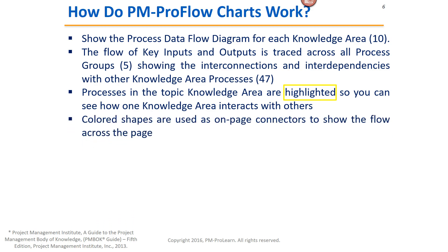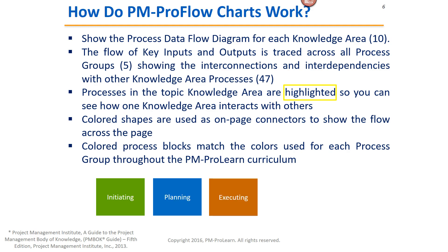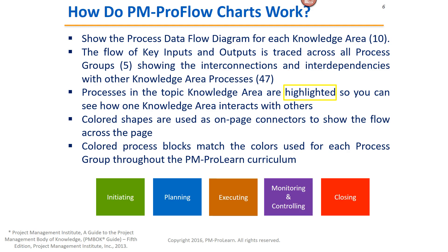Colored shapes are used as on-page connectors to show the flow across the page, because there's a lot going on, so we need to show you how things are connected. Colored process blocks match the colors used for each process group throughout our PMProFlow curriculum. Everything that's an initiating process is green, planning is blue, executing is brown, monitoring and controlling is purple, and closing is red. That helps keep you oriented every time we're talking about anything in the project management body of knowledge — oriented to what process group you are in.